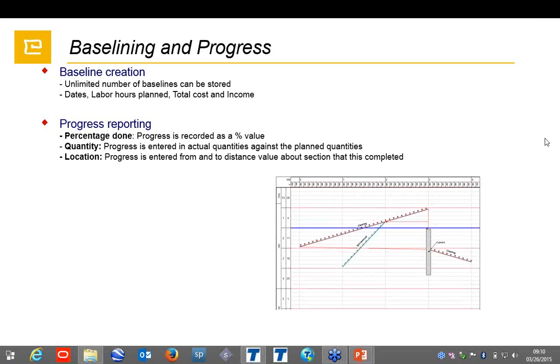To create a core activity, we are providing the productivity rates into the system. We can import the productivity rates for distance base. We can import them just from Excel if you have the values, and the system reads the rates and gives the duration calculation. So it is giving us a curve in the system. I can show later on.